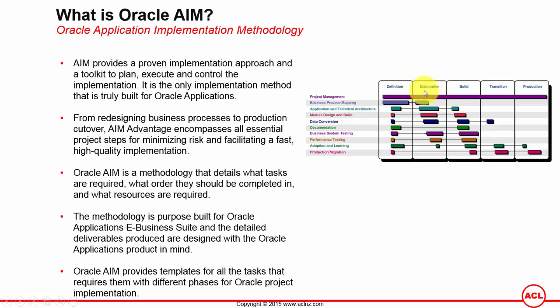Similarly, the elaboration phase is the one wherein the requirements identified in the definition phase would be further refined as per the client's business processes. Requirements which cannot be met with Oracle standard E-Business Suite solution would be identified as gaps, and then the consultants would work with clients to have them customized. We'll understand the entire process as we go along in the course.